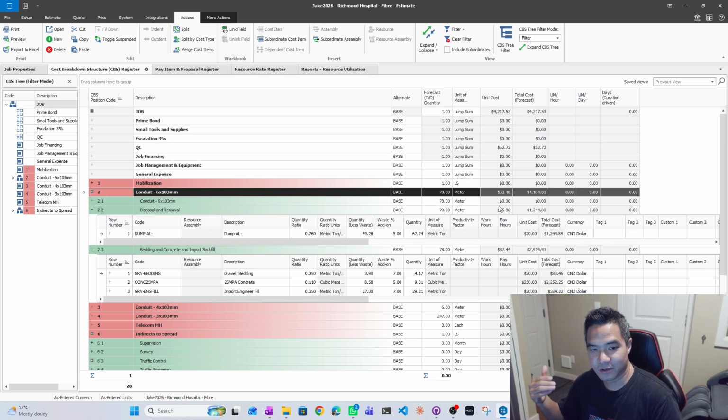Whereas your steady costs, like your equipment, your labor, and your productivity rates for this task, are going to be pretty much steady. That's where you're going to look for historical data, versus the varying costs. So I always like to break that out so that down the road you have that historical data to review.